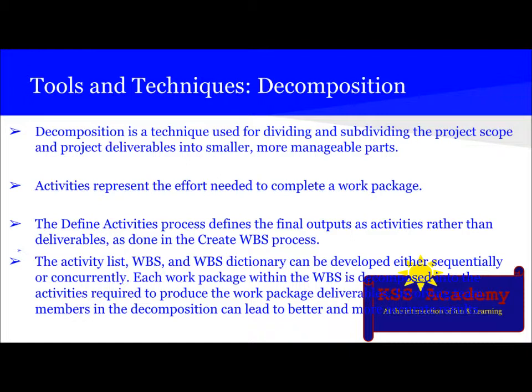The activity list, WBS and WBS dictionary can be developed either sequentially or concurrently. Each work package within the WBS is decomposed into the activities required to produce the work package deliverables involving team members, and the decomposition can lead to better and more accurate results.